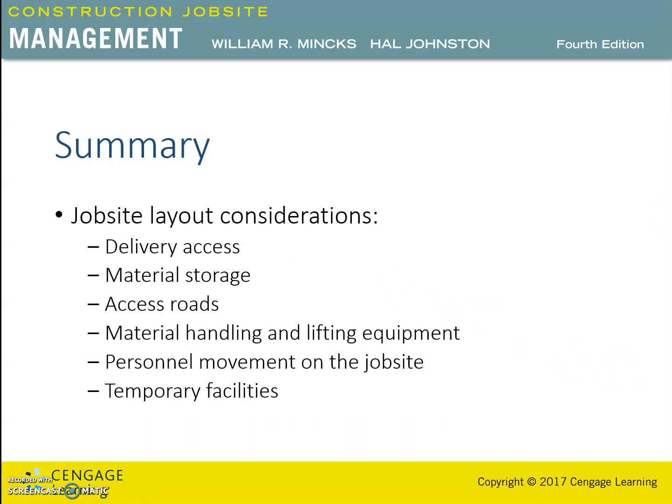So the contractor must plan organization of the job site as the construction of the project would be planned. After data are gathered and the method is established, the contractor has to implement it, and as with any other plan in construction, it must be flexible and accommodate changes in the construction process.